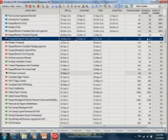And actually original duration in Primavera terminology is called planned duration. Right, so we could add a column for that planned duration field. And then I just use the arrow keys here to organize what order I want to see those columns in. Go ahead and click OK. And now you can see here's my planned duration versus my remaining duration. You can also see a column for actual duration, right, where the actual duration is going to show you how much time has elapsed since the start of the activity and the finish of the activity, or the start of the activity and the data date if the activity is not yet finished.